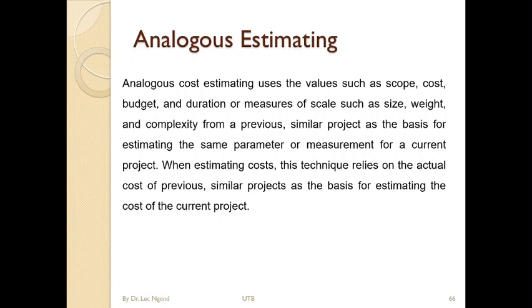Though Rwanda Revenue might be a bit bigger, it's huge, it has sites everywhere. So if it was 50 million for RDB, you know that it's turning around 60-70 million for Rwanda Revenue. So you base your estimation on a previous